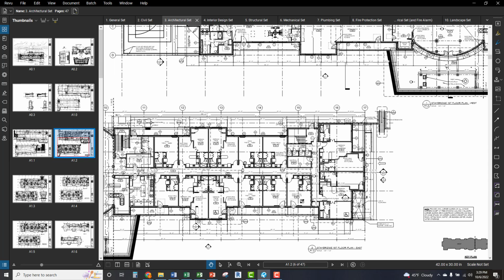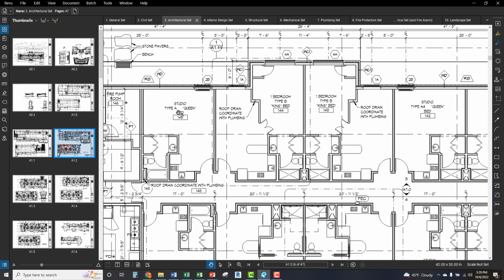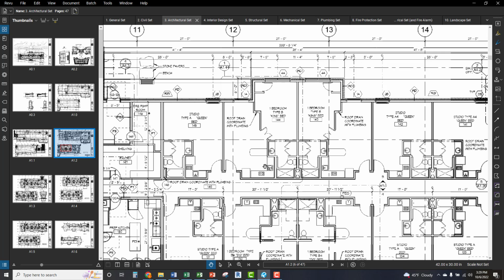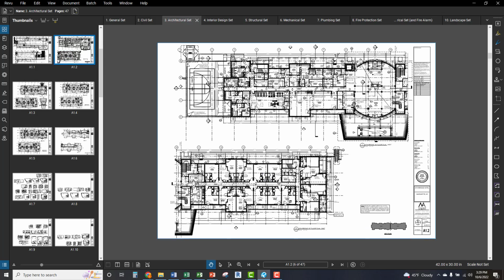The nice part about doing something like a hotel or apartment that has a lot of repetition is if we can figure out, for instance, this type A queen bed room, and we have a good idea of sequence there, and then we take an idea of this type B room, a king bed suite, we're just going to figure that one out, multiply it as we go through, and just keep adding onto the schedule, right? So instead of looking at an entire project as, how am I going to figure out how to do all this stuff, really break it down into sections.